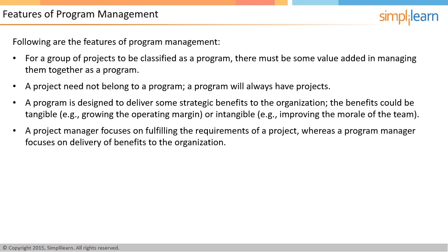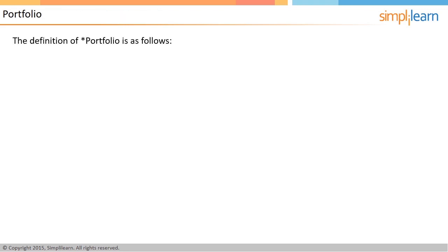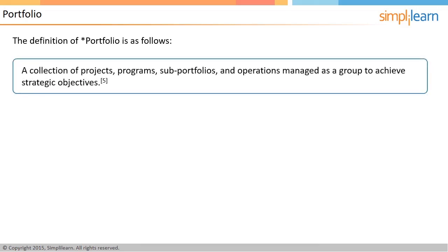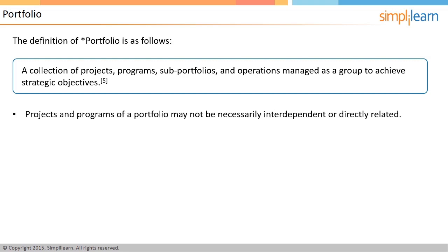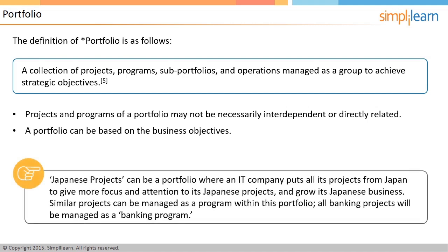A portfolio may have multiple projects and programs that are managed as a group to achieve strategic objectives. Note that all projects and programs in a portfolio may not be necessarily interdependent or directly related. A portfolio can be created based on business objectives. For example, an IT service company can have a portfolio named Japanese projects, formed with an aim to take over the Japanese market. Within this portfolio, similar projects can be managed as a program, and all banking projects from Japan can be managed as a banking program.